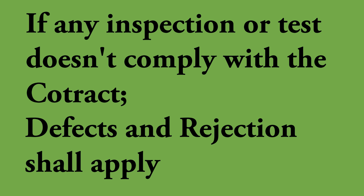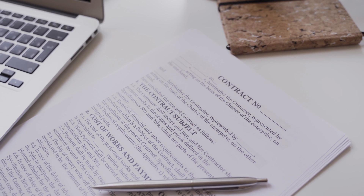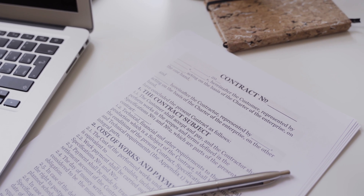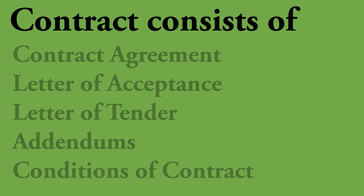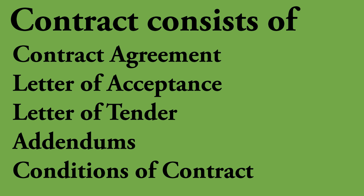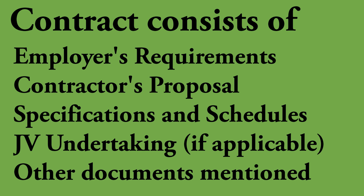Next, we'll talk about the definition 'contract'. When you consider a construction contract, it doesn't mean only the contract agreement — there are a lot more to follow, such as: letter of acceptance, letter of tender and addendums, conditions of contract, employer's requirements, contractor's design and price proposals, specifications, JV undertaking if applicable, and other documents mentioned in the contract agreement or LOA. So a construction contract is a very vast area.